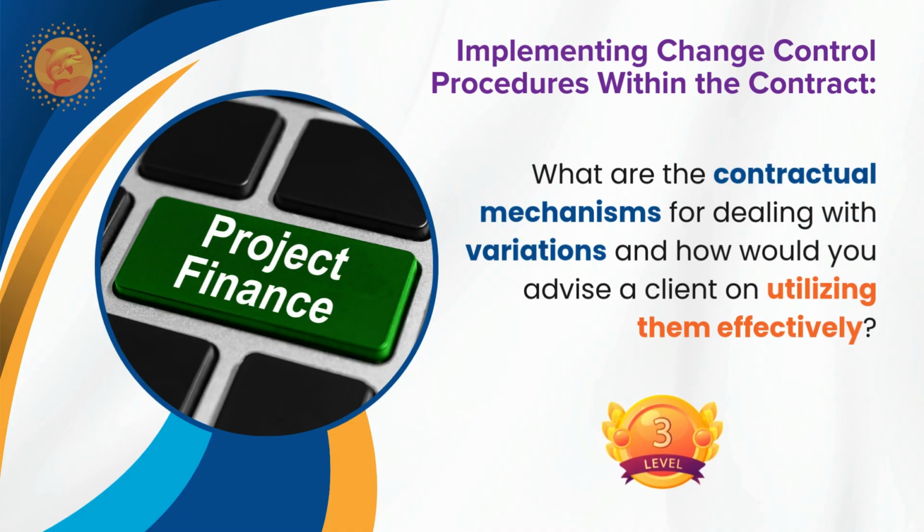Although you have some contractual mechanism, you have to define the program of work. Once you agree the baseline program, the time is agreed based on the baseline program. Similarly, the project protocol also, after the kickoff meeting or commencement meeting, you will define, circulate and agree between parties how you maintain the timeline within the project.